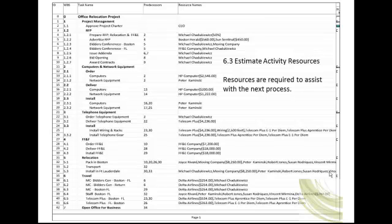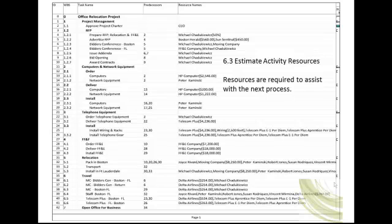The next process, 6.3 Estimate Activity Resources, is fairly straightforward. The project manager estimates what resources will be required to complete the activities. The project manager may not know what specific resources are available but can assign a skill set to the activity. In this example, the resource is indicated by the general terms Furniture Vendor and Moving Vendor. Take a minute to reflect on the iterative nature of planning. You have to prepare an RFP but at this point do not know when the services of the vendors are required. You must complete the schedule first. However, the schedule will not be accurate without identifying when the resources are available. Both the RFP and the schedule will go through several iterations before either will be accurate.